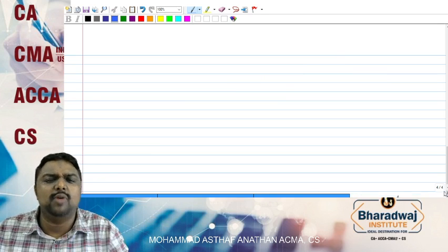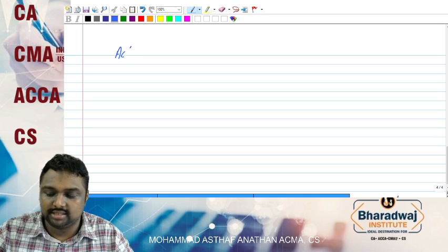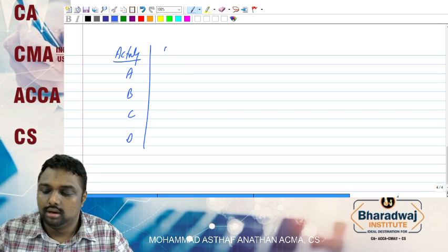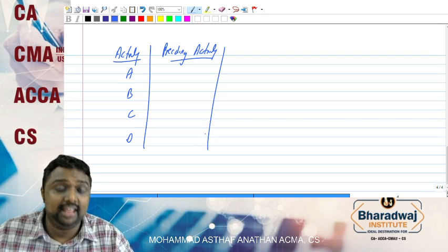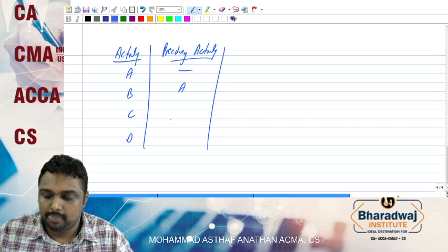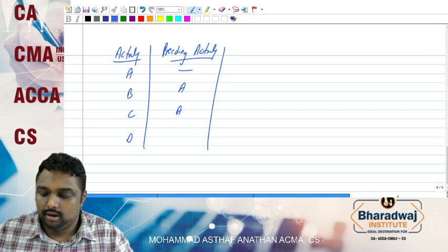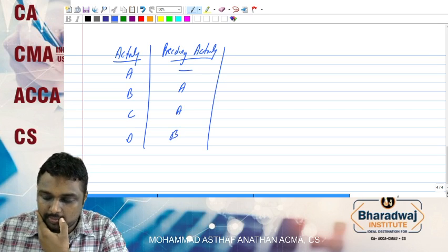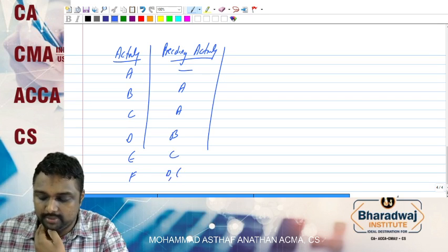You have already learned this in your intermediate level, but anyway, we will discuss. Let us take some activities A, B, C, D and so on. First point, preceding activity. What is the meaning of preceding? Just before. For A, there is nothing. For B, it is A. For C also A. D comes from B. E comes from C. F comes from D and E.